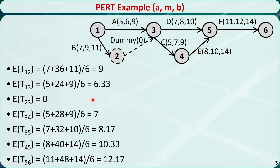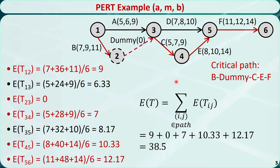For this example, we know from previous videos that if the durations are known precisely, the critical path is B, dummy, C, E, and F, with a duration of 38 days, which is the total length of the project. Now assume the critical path will not change even if we consider the uncertainties. Then we can calculate the duration of the critical path by adding up all the expected durations of the activities on the critical path. It is equal to 38.5 days.